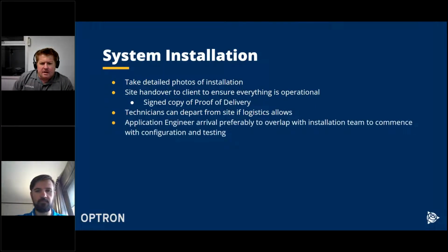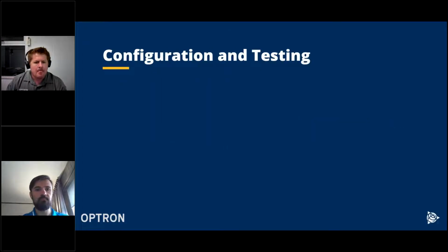The application engineer should preferably arrive a couple of days before the technicians depart, so that it can overlap with the last part of the installation, so that both parties are available for configuration and testing. So that brings us to configuration and testing.